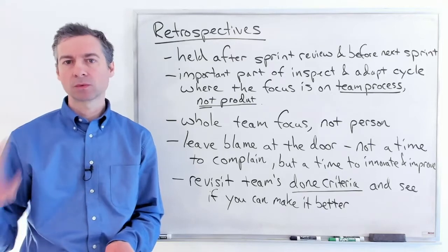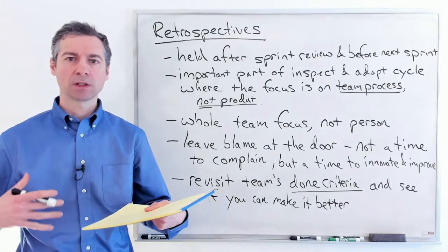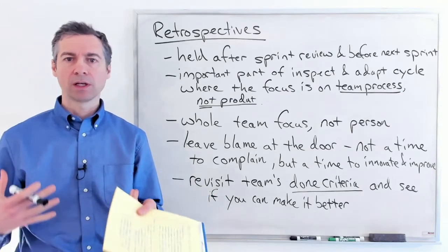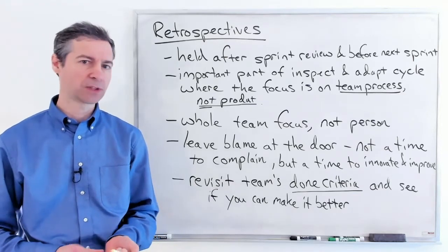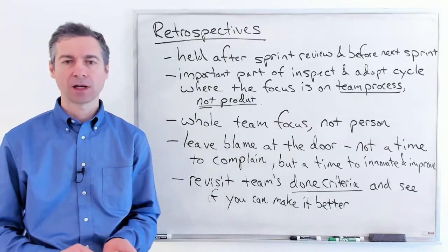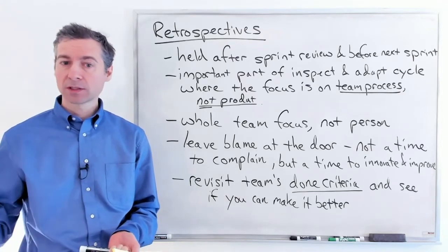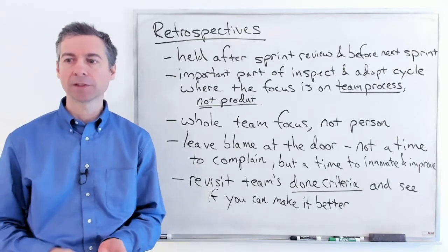Then we have our sprint review with the client where we go over the deployed working value, the working code, the new features, everything successfully added to the product during the sprint. And then before we head into the next sprint, it's time for the sprint retrospective. And that's what we're going to talk about now.